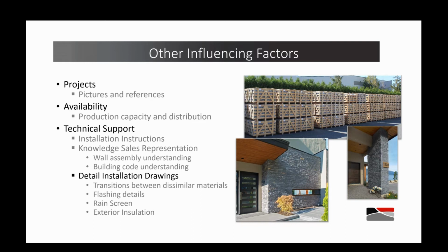Obviously, natural stone isn't manufactured in any way, but there is typically some fabrication involved. And as with any facility that fabricates, there's going to be capacity constraints. So particularly with bigger projects, it's wise to ask some questions about the capacity and about the distribution of that particular stone.